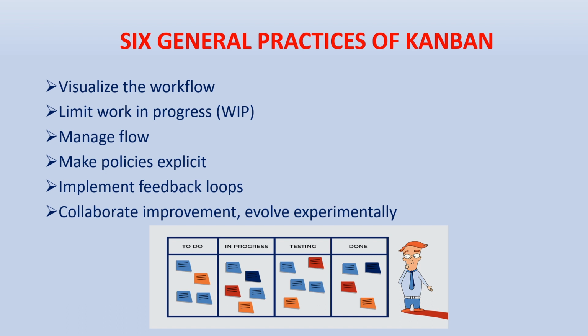We can have just 5 tasks in progress, and similarly we can put 5 tasks into the testing. This will help us, as we will have only 5 tasks, to focus on only those tasks and we will complete the tasks sooner.